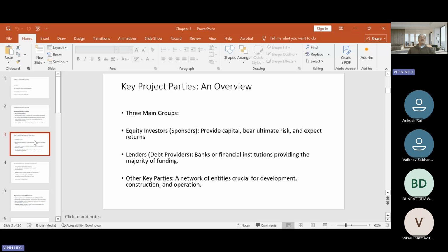So as far as project vehicle is concerned, second one, this is project vehicle. What do you mean by project vehicle? Infrastructural projects mostly involve these project vehicles. They are responsible for evolving and delivering a bankable project, then implementing the project, and thereafter operating it in a financially viable manner. This project vehicle selects and appoints all the project contractors, right? And then they negotiate and execute the contracts. They also raise the finance, supervise the construction and commissioning, and operate the project either directly or through an operations and maintenance, that is O&M, contractor. Non-infrastructural projects may involve an SPV or could be an extension of the existing capacity or integration.